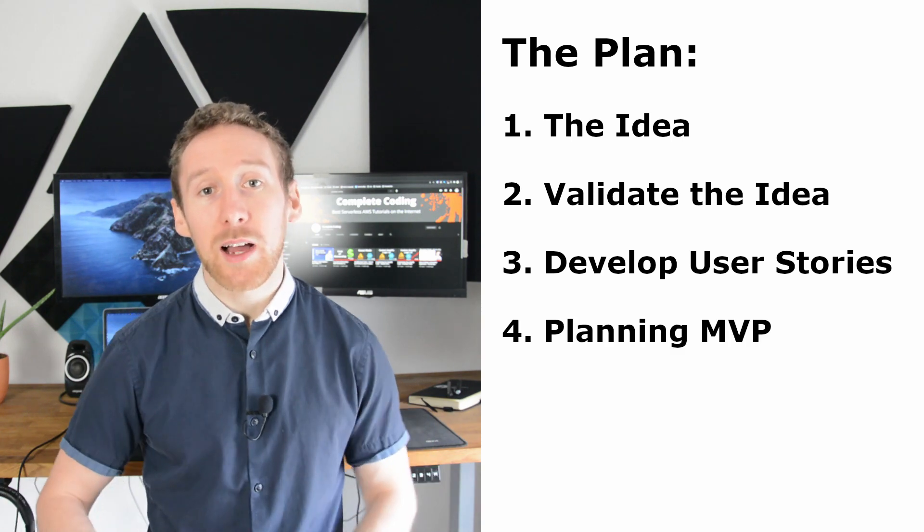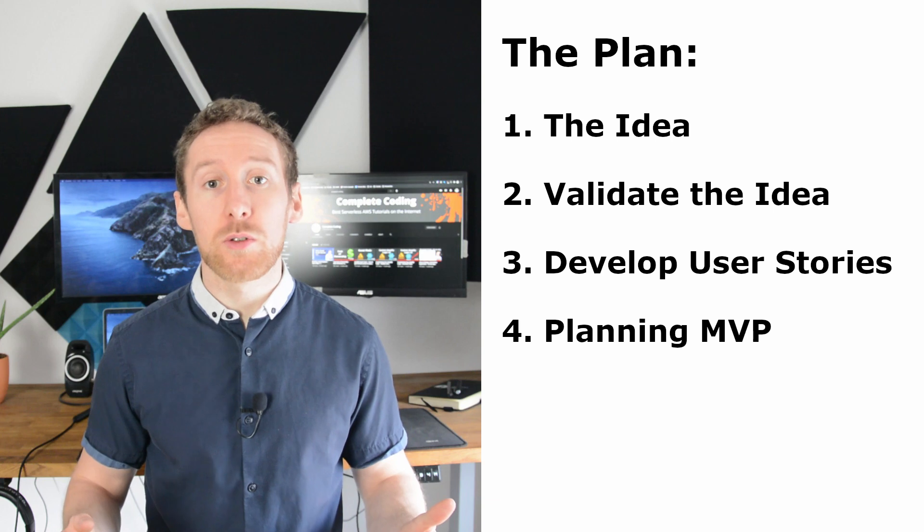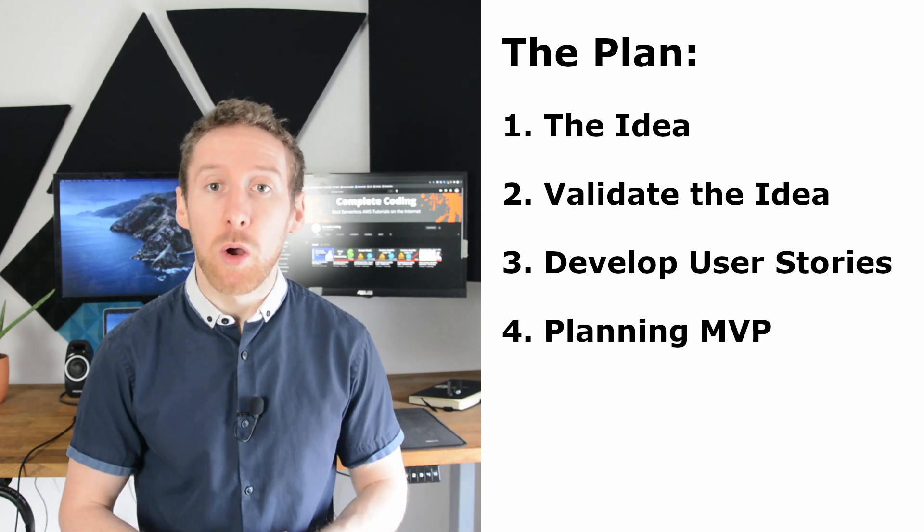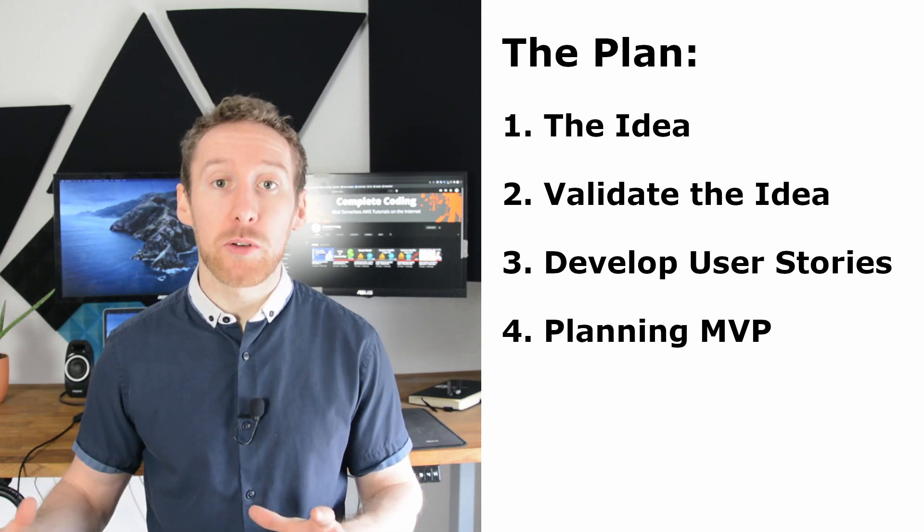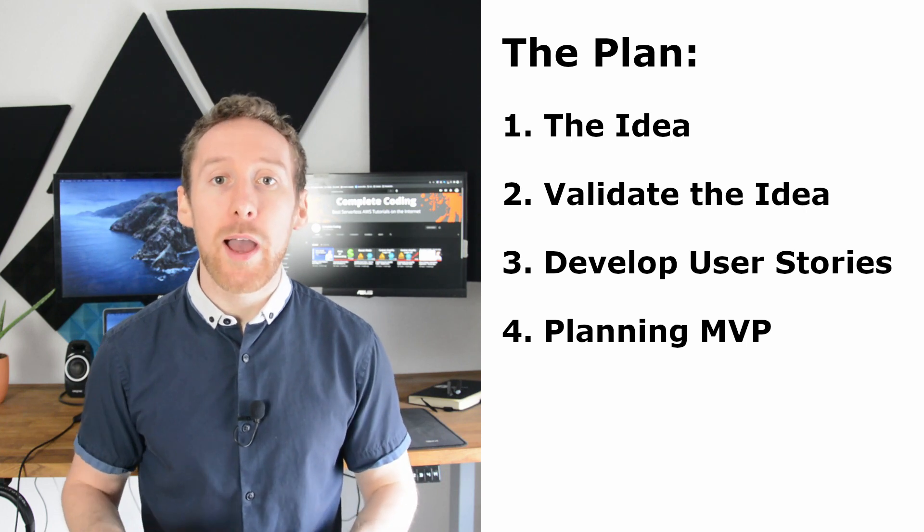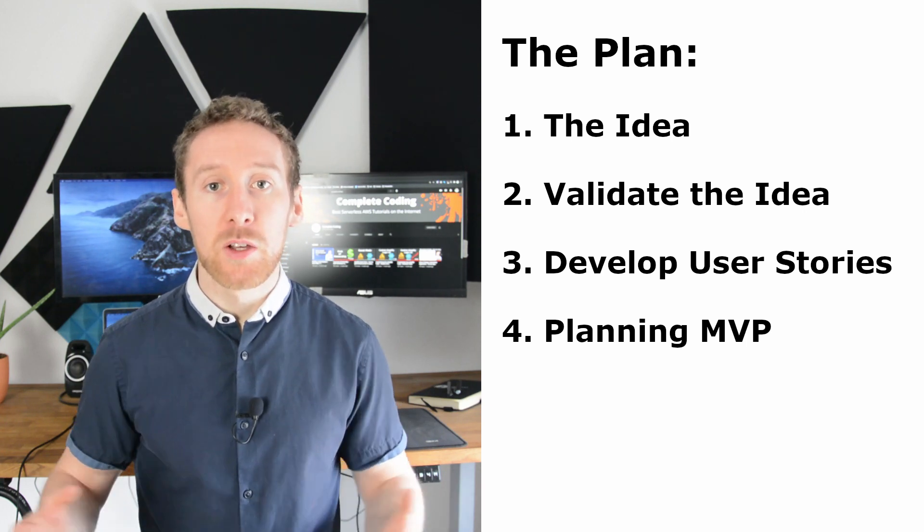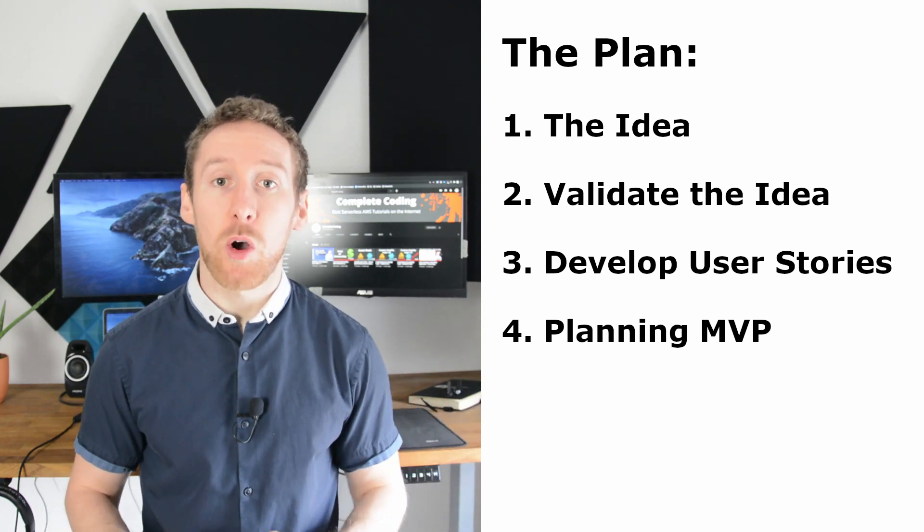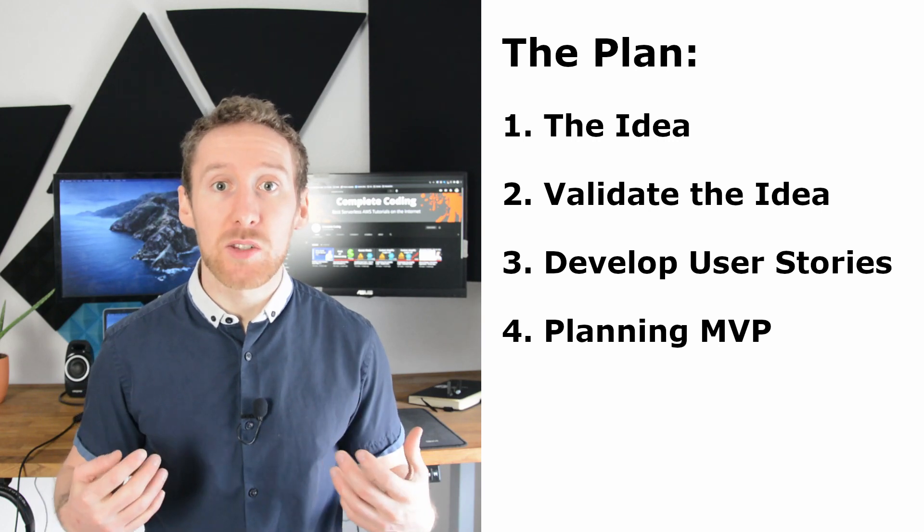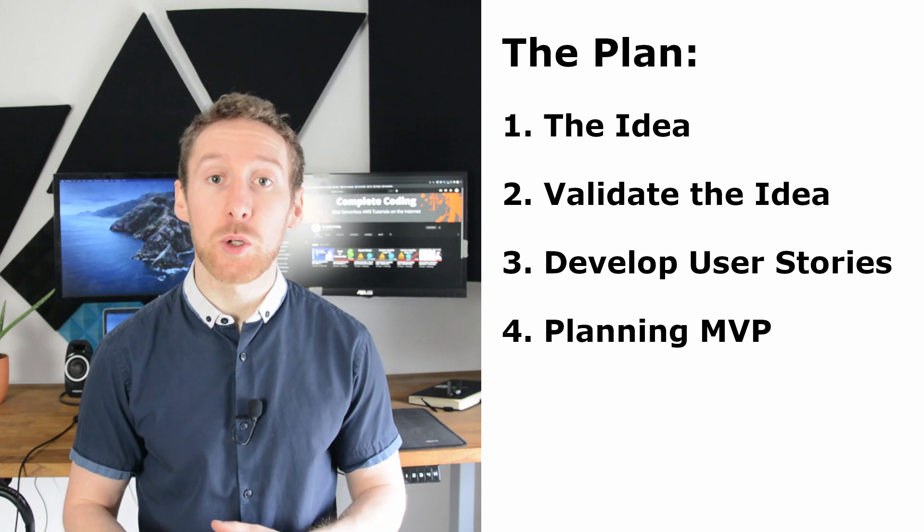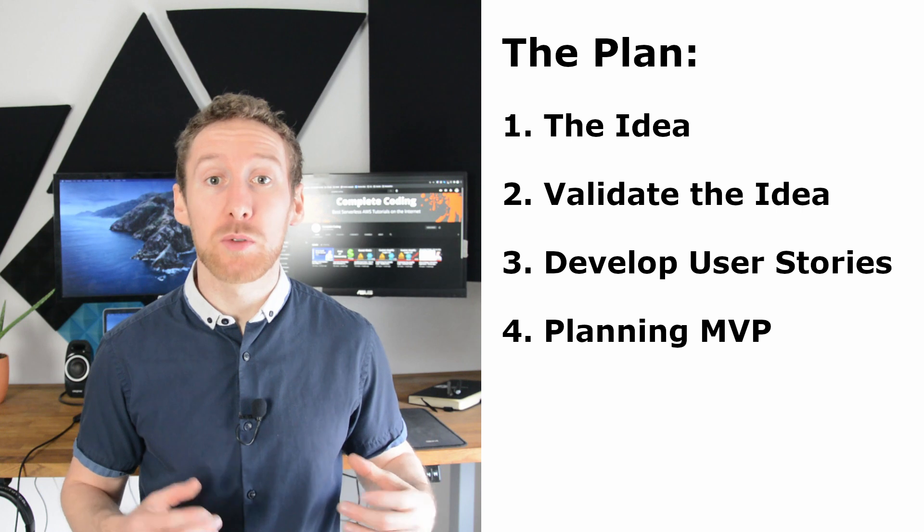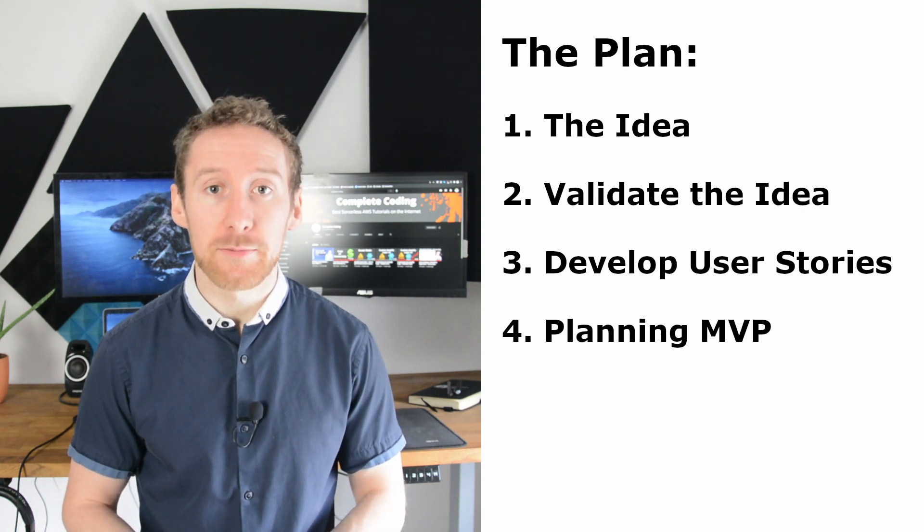Now that we have the list of our user stories, we want to start planning out our minimum viable product or MVP. This is the product in its absolute minimum state where it is actually useful. So take your user stories and order them in terms of absolute necessity. So in my case, I definitely need to be able to post to LinkedIn. But for example, I don't really need to be able to post images or videos for my initial version.